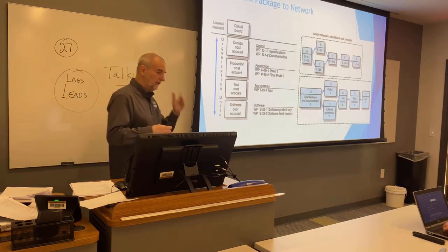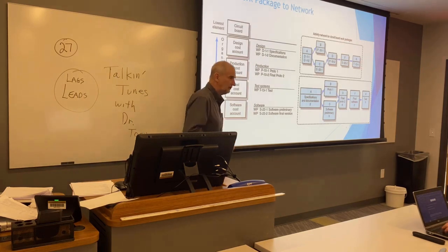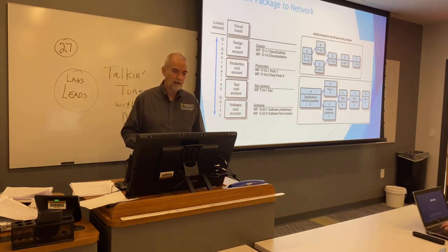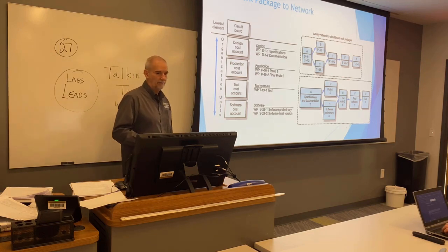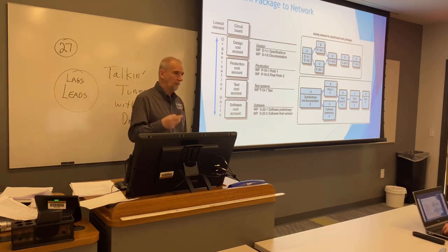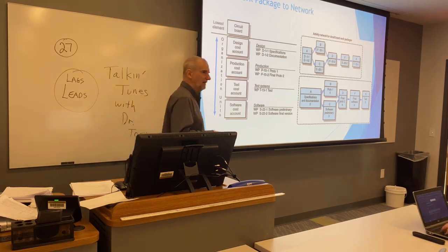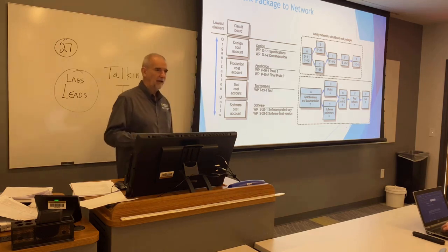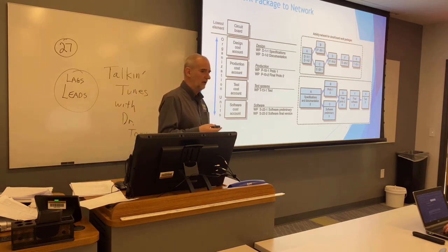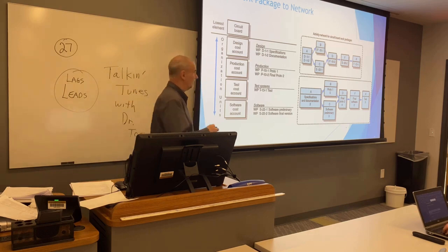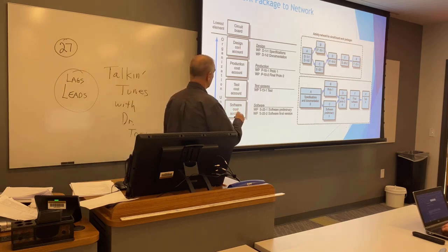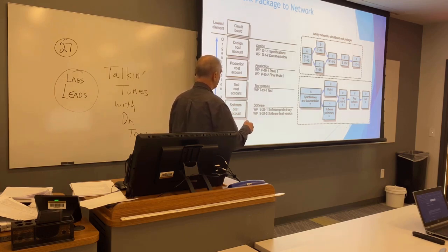The first thing we're going to do is see the relationship between the work breakdown structure and the network diagram. As you recall from the exam, one of the questions was, what is the lowest item in a work breakdown structure? And the answer was a work package. Here we have a bunch of work packages related to these different organizational units, and we have 7 work packages here.